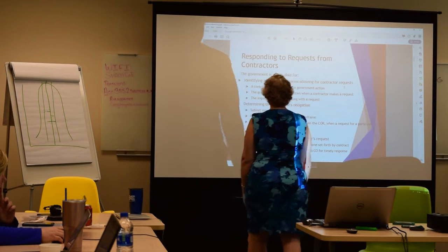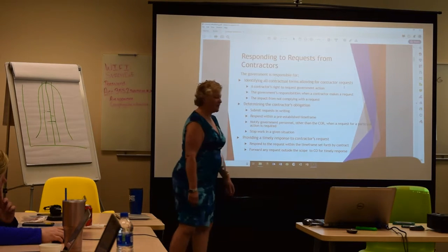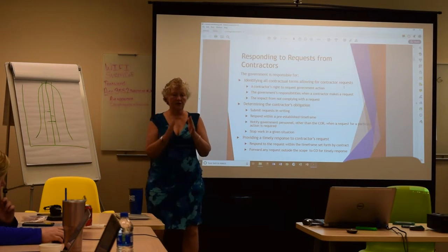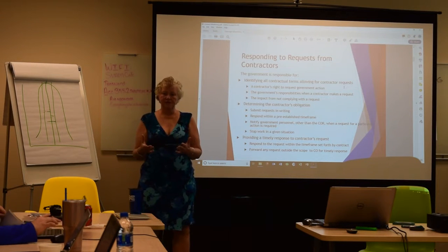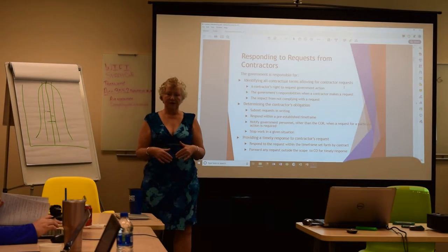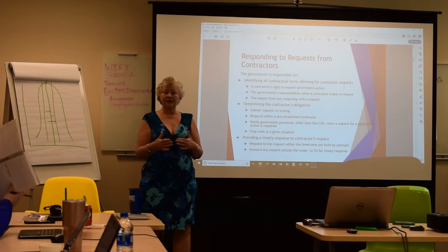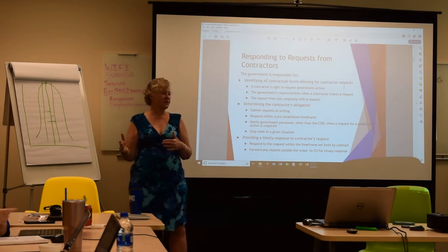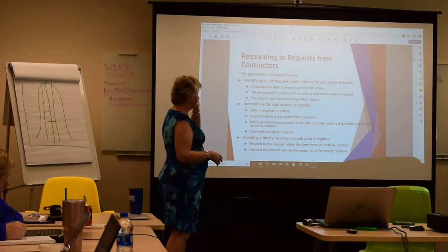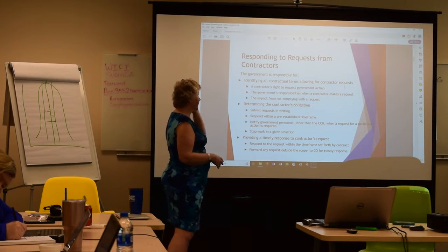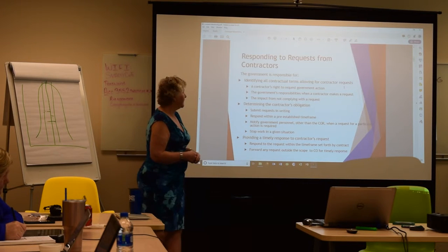So when we say they have to respond to contractors, keep in mind that you're chugging along on your project schedule. And if you need to know something and they don't get back to you right away, now all of a sudden they've created a delay and it could potentially cause you to miss milestones. So it's really urgent on their part to make sure they get back to you with any answers to questions.